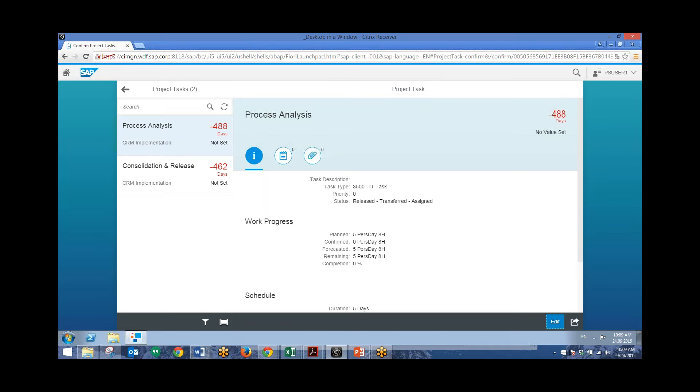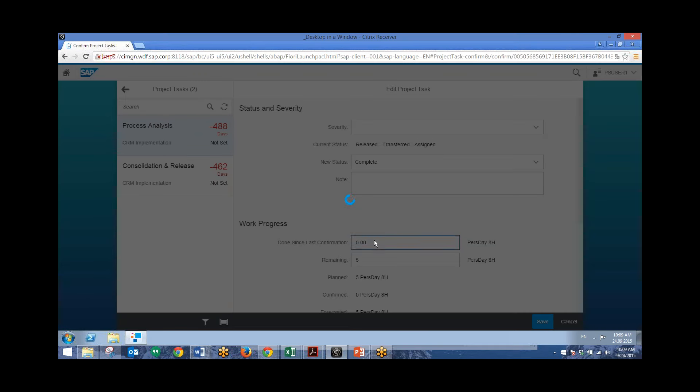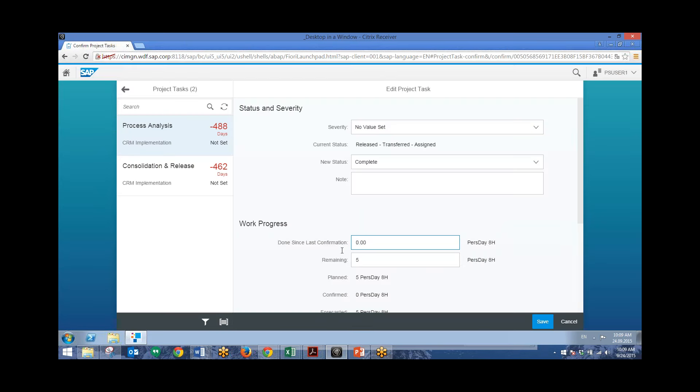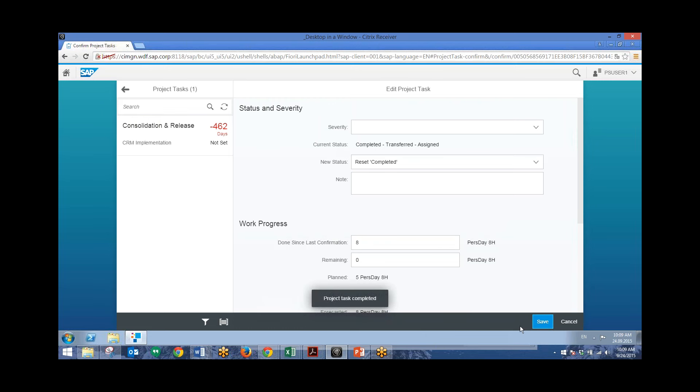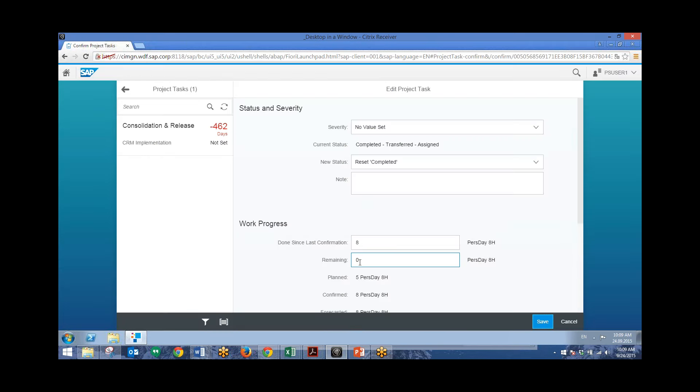You can go in and click Edit and enter in your work progress. And so we'll put in eight hours here for eight hours of work since the last confirmation. Go ahead and click Save. And you can see that that project task has been completed since there was only five hours total remaining and we entered in eight.